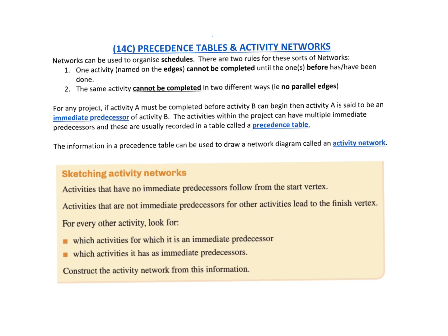In 14C we're going to look at precedence tables and activity networks. Networks can be used to organise schedules. There are two rules for these sorts of networks. One: an activity named on an edge cannot be completed until the ones before have been done. The activity is the edge in these scheduling networks.